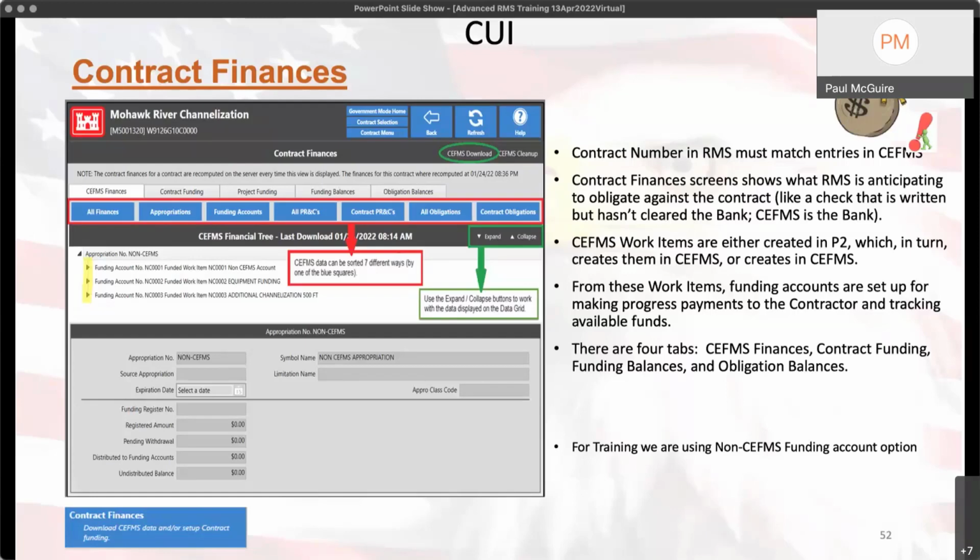This is why it's very important when you're linking stuff up to P2 that inside of the contract description, you have the correct contract number. Whether or not your contract number has dashes, whether or not your contract number has spaces. Because a lot of times when things don't link up with P2, it's because of that. They don't have spaces, or they do have spaces, or the delivery order number is a little bit different than what it was inside of P2. Not having those synced up will also affect CFMS as well. So you can go in and change that and then hit the CFMS download button, and that will do an immediate, I want to pull information from CFMS now, instead of waiting for that batch process that we talked about earlier to finally get around to your district and pull data from CFMS.